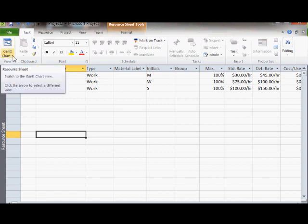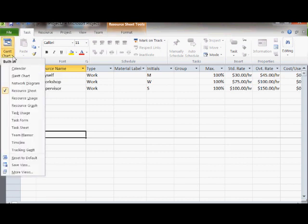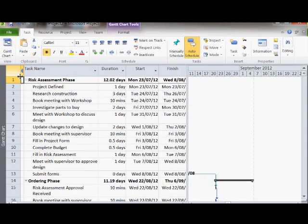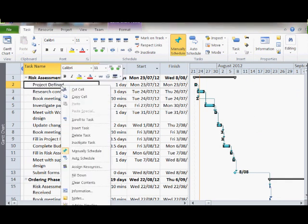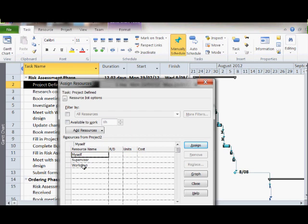We can now go back to our Gantt chart and assign resources to our tasks. To do this, select the task, right click, and select assign resources. You then need to go to each resource name and enter the percentage of time that resource will be allocated to that task.